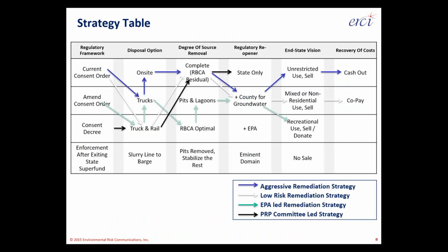To get to that point of having a preferred strategy, you need to go through an exercise like the following, a strategy table. And to get that, you need to identify what key issues are of concern on an individual site. So in doing this strategic analysis or decision analysis on an individual site, we find that as quick as it is to use this sort of table and display the information, it takes a lot of thinking to get to this and often several iterations to get it to a professional standard of care.